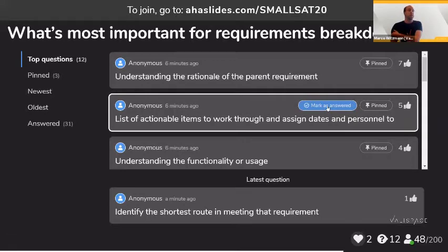Also be honest in this, right? Especially if you're looking at this internally, you don't always have to share this with your customer, but at least inside your team, put in "engineering guess." Then when you come back and find that there's a problem with this, you know it's a different kind of discussion than if you say this is the datasheet and we lose the guarantee the moment we use this thing one more time than we should.